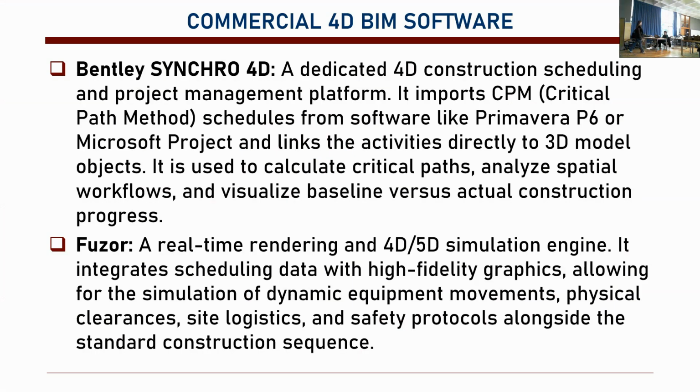So, what kind of software are we talking about for 4D? We've got Bentley Synchro 4D. Synchro brings the CPM schedules from, for instance, Primavera or Microsoft Project, and combines them with the 3D model. We used to have Synchro, I think, but I don't think we have the license anymore. Fuzor, again, is a real-time rendering 4D, 5D simulation engine. This makes it look even better.